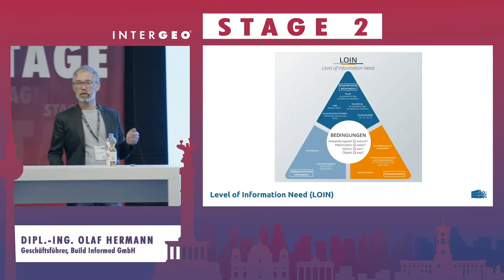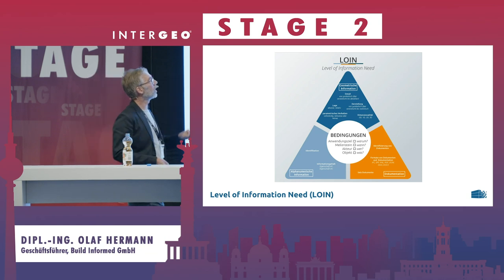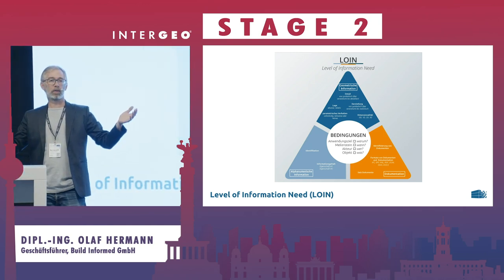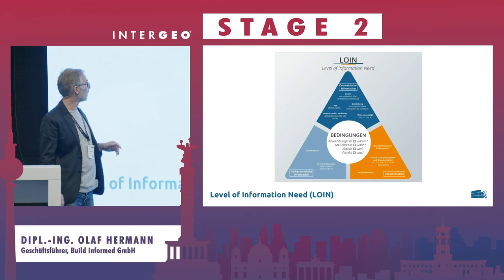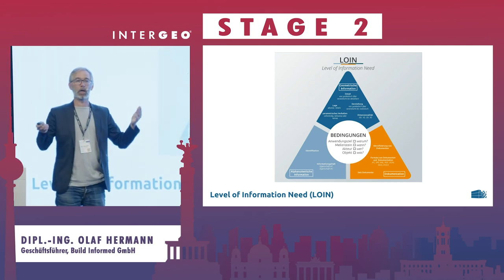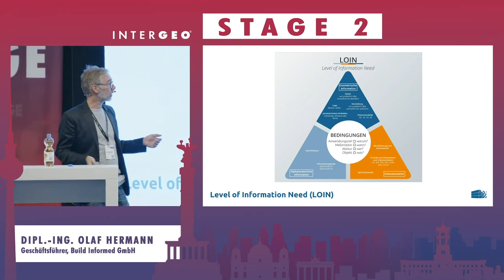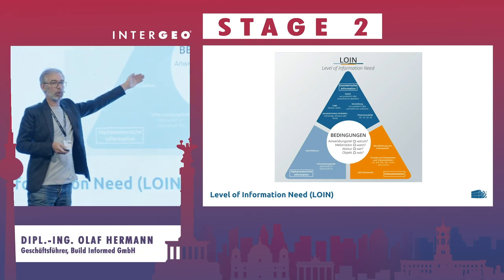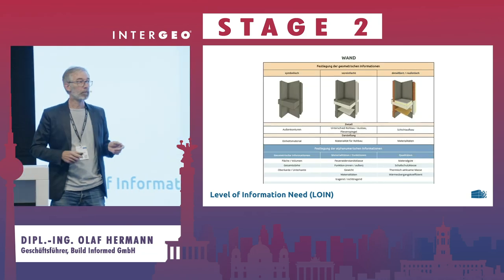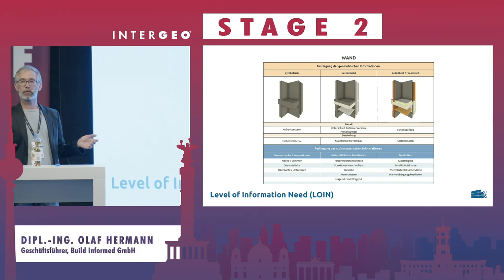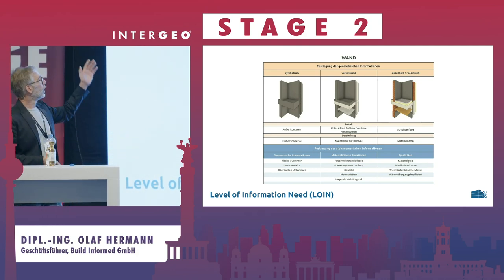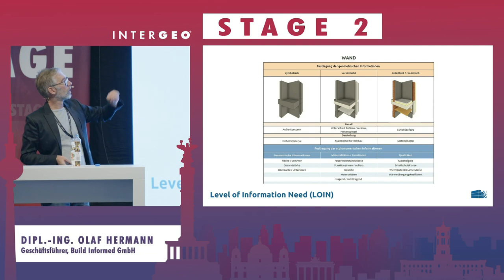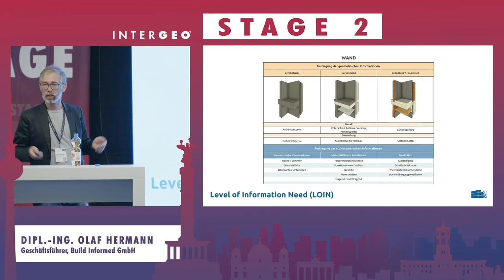We're talking about the level of information need — what should be in the model. To explain this I have a slide. It's in German but I'll explain it. On one hand there is geometrical information — we have to discuss, for example, how a door looks, which details are inside. Another thing is the alphanumeric information: which parameters and attributes I want in the model, and for what. And at the end, in which format I deliver the model, and very importantly, why I'm doing this — the Anwendungsziel. So we have our own LOIN for every project. We bring this to the table, take the customer with us, and ask what they need. Let's talk about all this geometric and alphanumeric information. It takes some time, but it's really necessary.